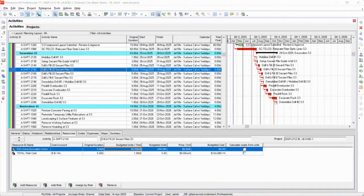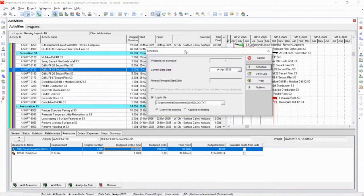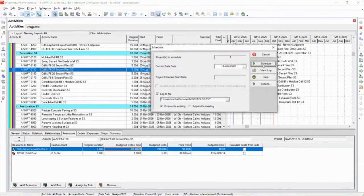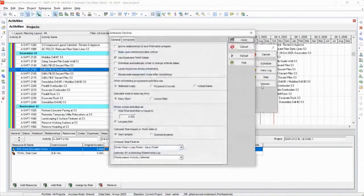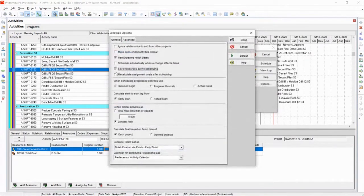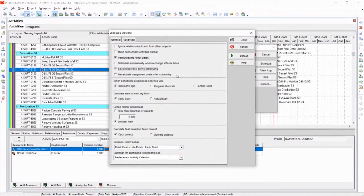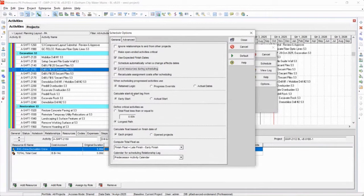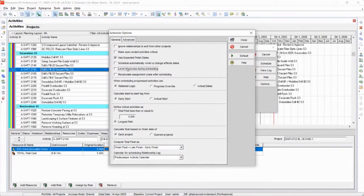You know what else? There's a setting in the scheduler. In here, you can say level resources during scheduling. So what it'll do is it'll schedule and then level the resources and then show you the results. So it's always running both scheduling and leveling every time you schedule. And that's a way to sort of capture it as well.